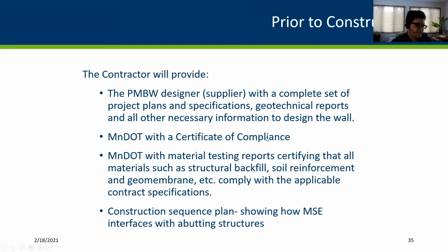If this should be an MSE wall, which it can be, again, that backfill material becomes very important, and a pH limit is put on the material to prevent degradation of the soil reinforcing. All of that will be supplied a minimum of 15 days before the construction of the wall, and you should make sure that those are received.